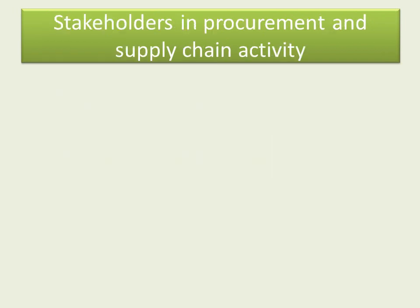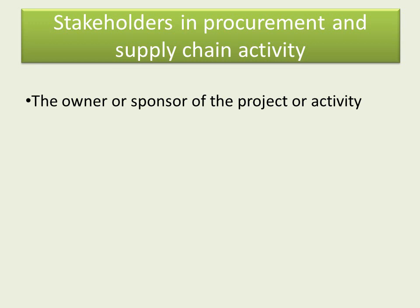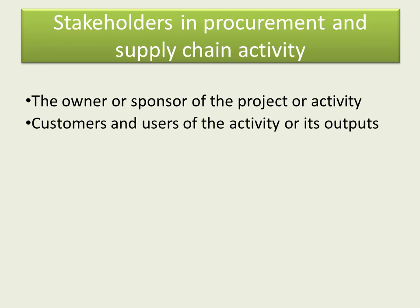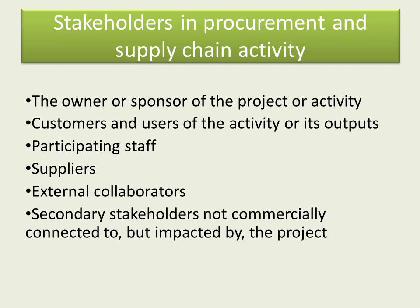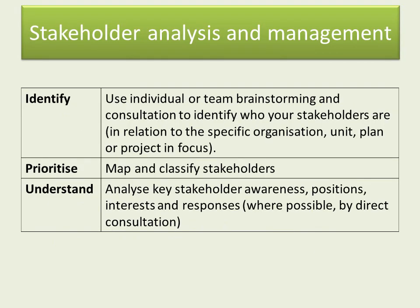Stakeholders in procurement — if we think of a particular project — can include the owner, sponsor, customers, users, staff, suppliers, collaborators, and perhaps secondary stakeholders not commercially connected but impacted by the project. When listing stakeholders it will be fairly wide-ranging. We need to identify them perhaps by brainstorming or consultation, prioritise them by mapping and classifying them, and understand their awareness, positions, interests, and responses, perhaps by directly talking to them.